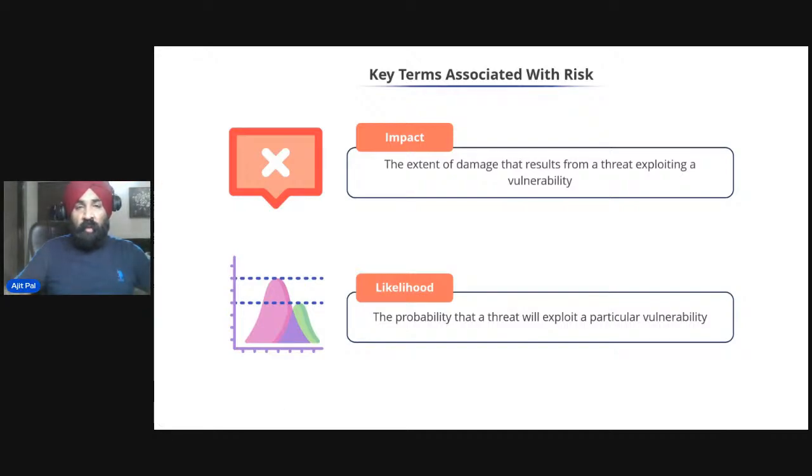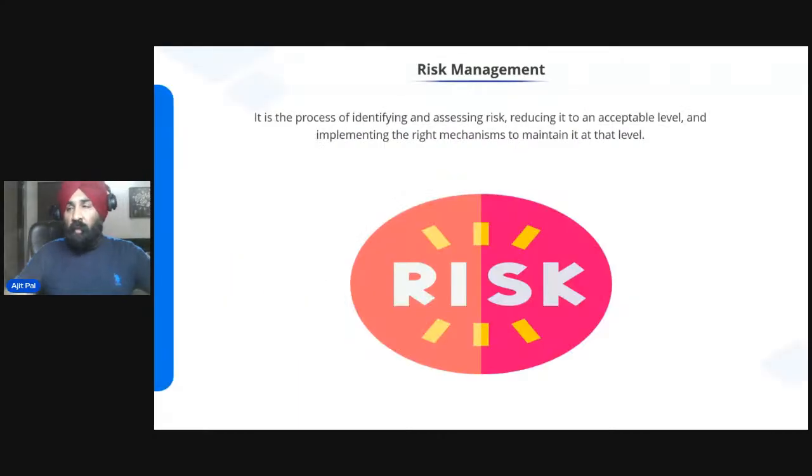So risk analysis, I would say risk management, is a process of identifying. The first step is identifying. Then once you identify the risk, you have to assess the risk. When I say assess the risk, find out the likelihood and impact. Like I found the risk that my audio gear may go down as it is a single point of failure. This is what I have identified. Now I have to go one step ahead and find out the likelihood and impact of it.